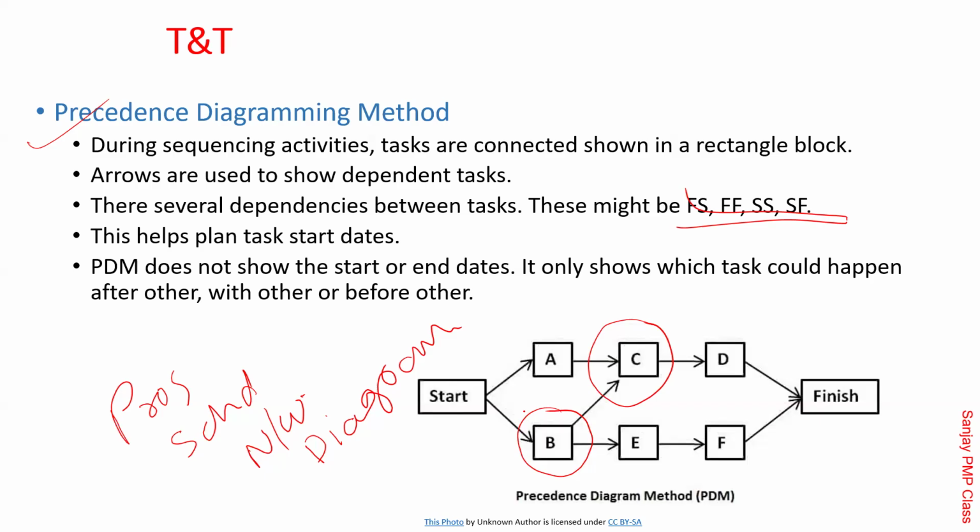Maria, you are saying something? Is it also, in other words, an activity that has multiple predecessors are path convergence, right? And if there are multiple successors, then path divergence. Pawan, did you see how a question can be asked in English? Did you notice what Maria said exactly could be the question?